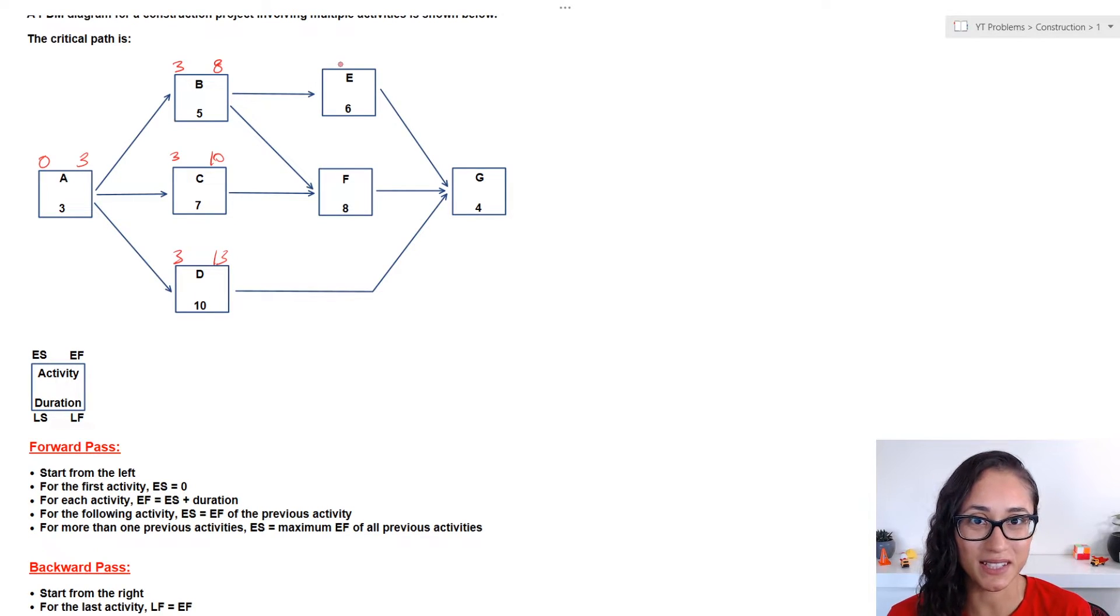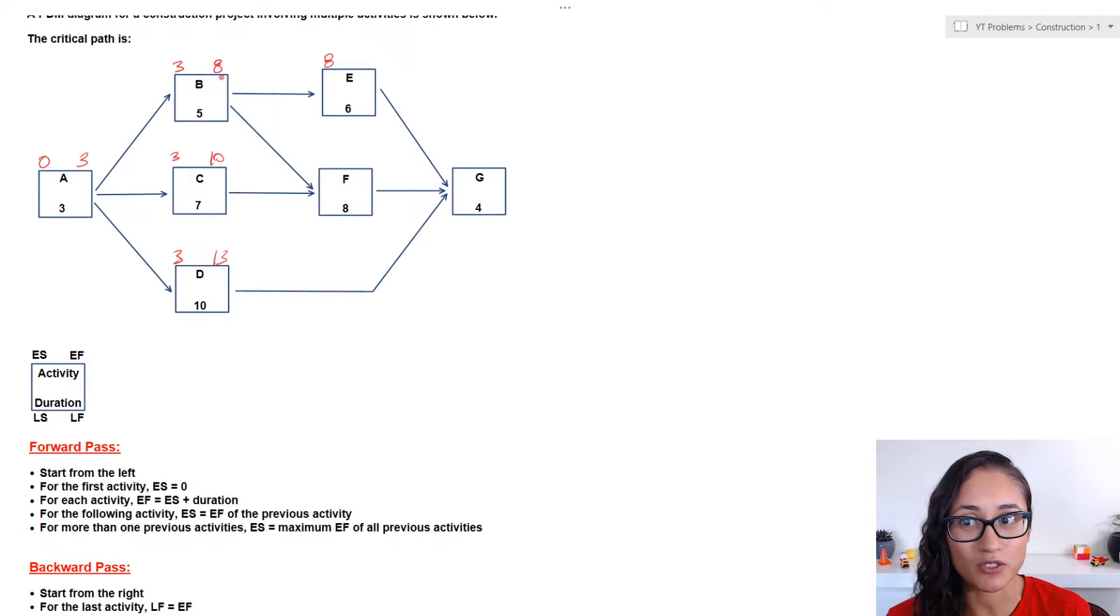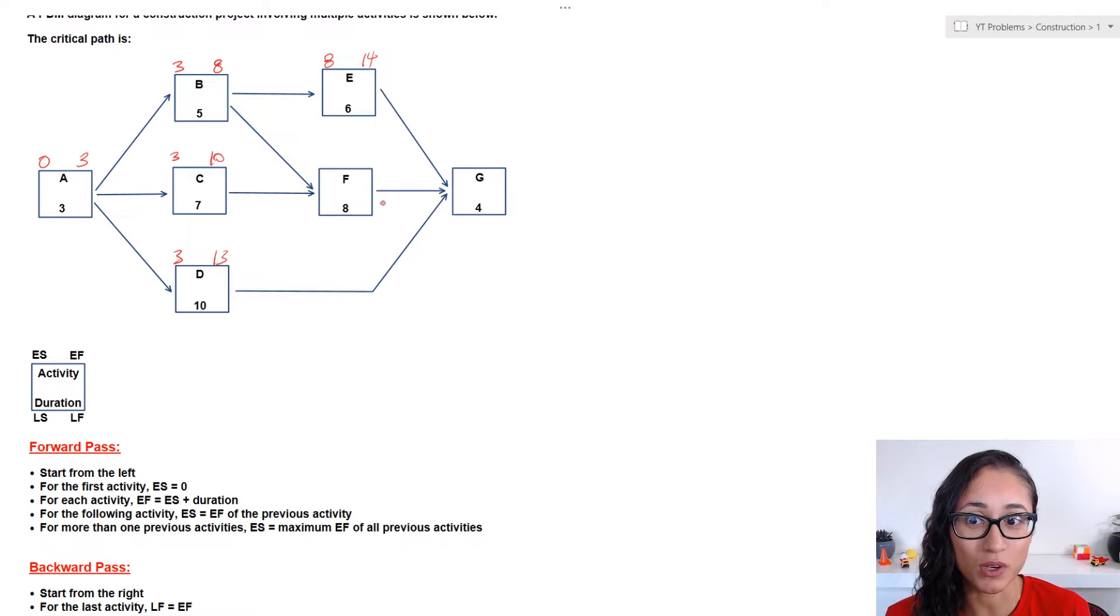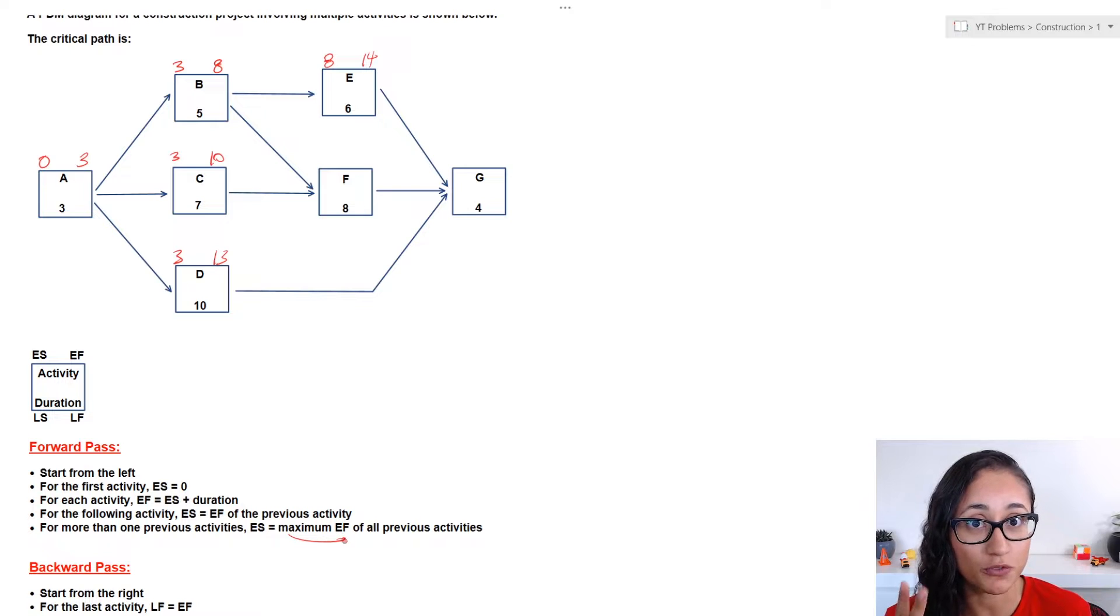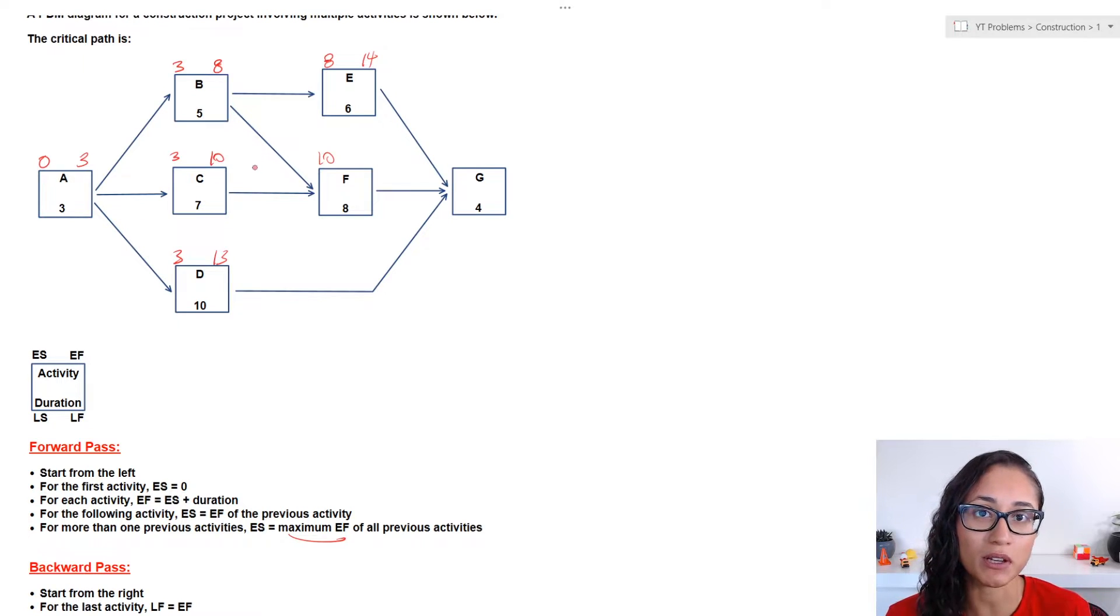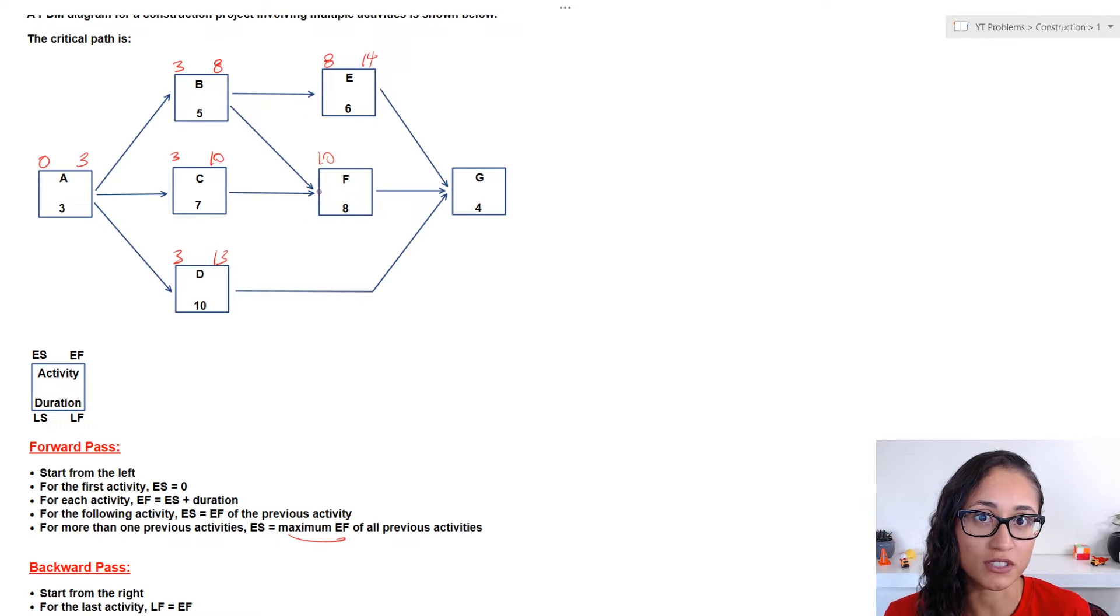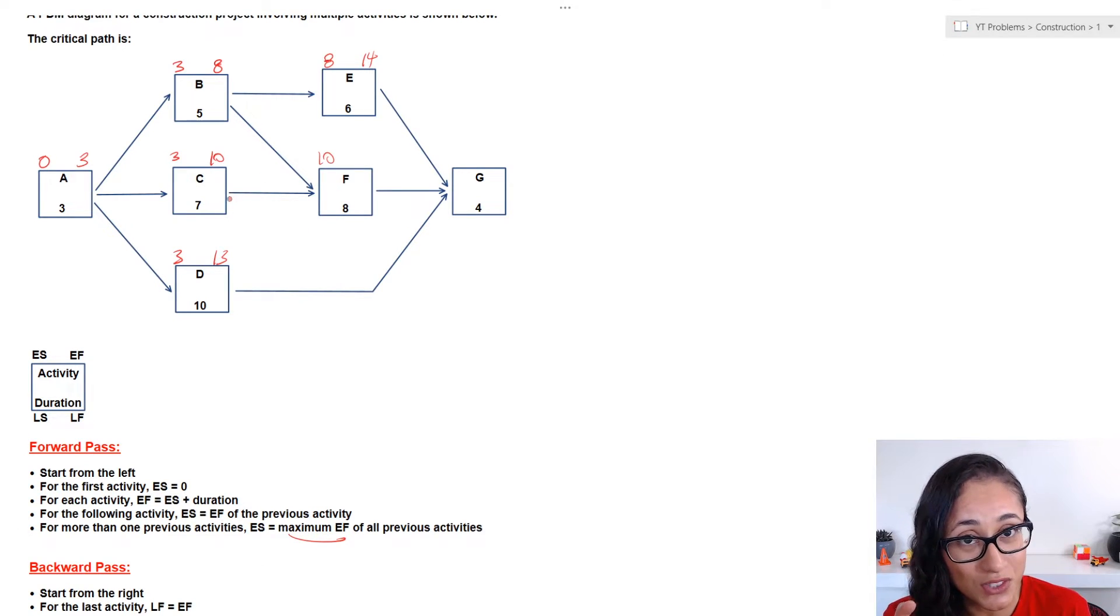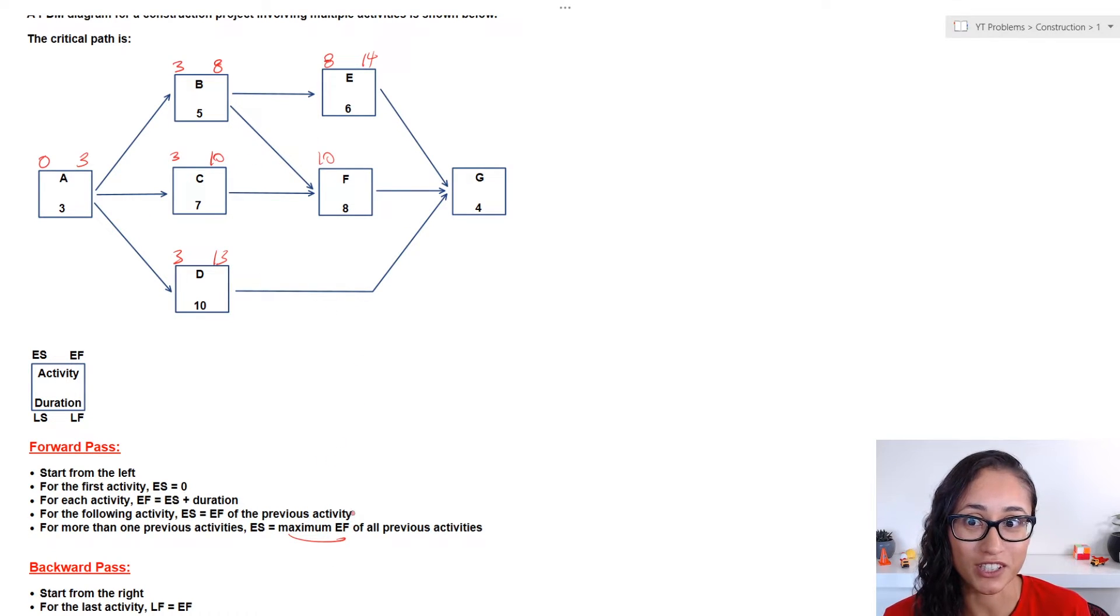Now, let's take a look at activity E. Well, activity E cannot start till B finishes. So, the early start of E is going to be the same as early finish for B. And so, eight plus six gives us fourteen. And so, that's going to be the early finish for E. Now let's take a look at activity F. Well, F is actually dependent on two activities, B and C. So, in that situation, we actually have to pick the maximum early finish. So, for this case, it's going to be ten, because that is the maximum early finish. Also, think about it this way. This means that activity C has to finish before F starts. Now, if B finishes at eight, but C has not finished yet. C is going to finish till day ten. And F cannot start till activity C finishes first. And that's why we always go with the maximum early finish.